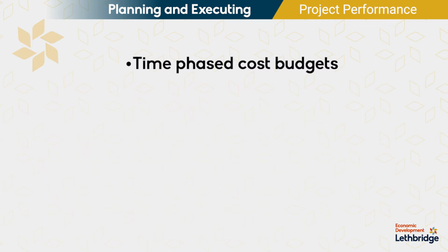Thus being maybe somebody's guess at it. You're talking typically plus or minus 50 to 100% in those estimates. When we start looking at planning out the projects at this time phased budget level, we want a more detailed budget. We typically would be looking at functional area staff and managers to help us with those details. We may look at other projects that are similar and refine specifically what that particular work package is going to cost. So a little bit more effort is done into the budgeting at this level, and we're trying to get these within plus or minus 10% budgets.